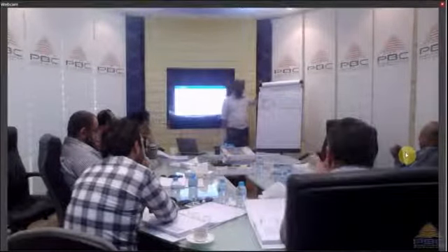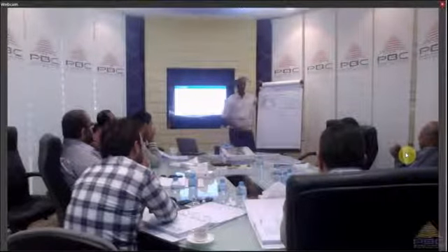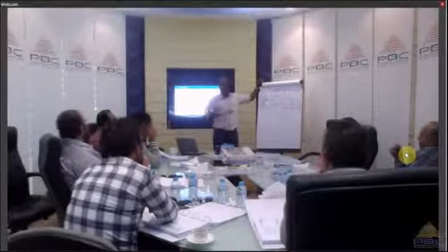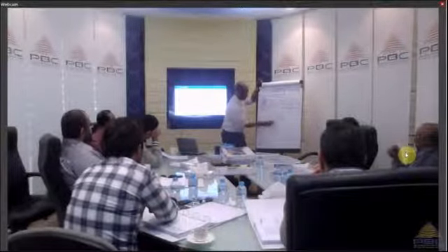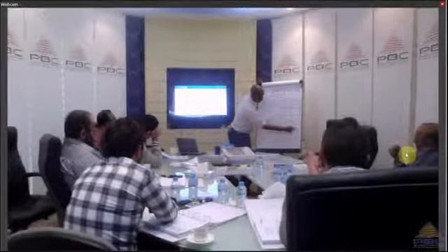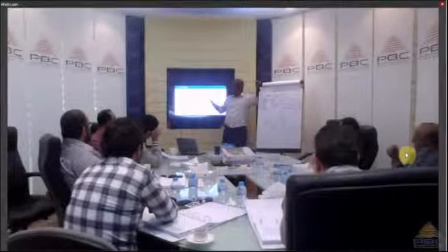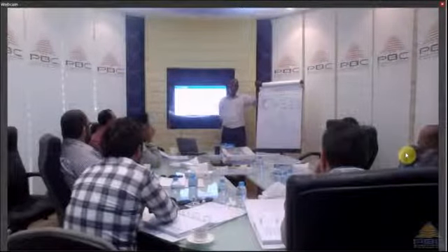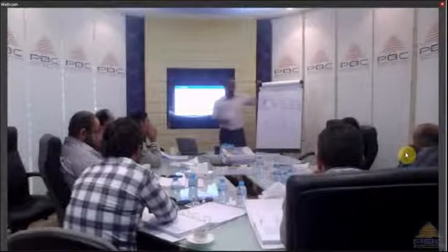Sometimes if I have a major project in KSA to build, let's say hospitals across Saudi Arabia, I will have a project in Riyadh, a project in Dammam, a project in Jeddah, and a project in Abha. So this is called forming the WBS using sub-projects, be it by geographical location or so.